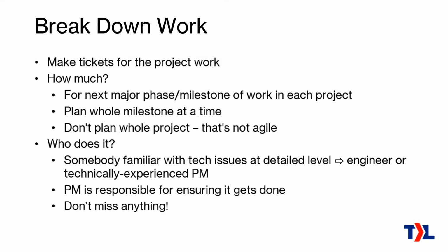So if you need to get help for that, then definitely do so. The important bit here is not to miss anything. In my experience, this is the easiest way to blow up your project budget: there's some bit of work that is necessary and you should have known it. Considering you're the expert on this stuff, you should have known it at the beginning, but you didn't write it down anywhere. It got missed. Turns out it's inevitable. You've got to do it in the middle of the project. That's the biggest way to bust your budget, so definitely make sure you're thorough on this stage.